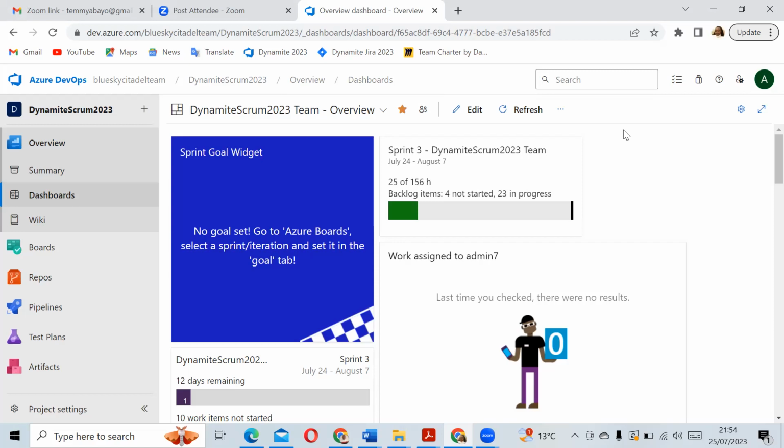Now, it's not the developer's job to go into the backlog and start looking for bugs. It's like you working in an office. Anything that is not in my entry, you don't want me to work on it. That's what those columns represent. So any bug you create and you want the developer to work on, you put it back into in-dev. But like I said, normally once you create and save, they don't know that the state takes it back into the backlog.